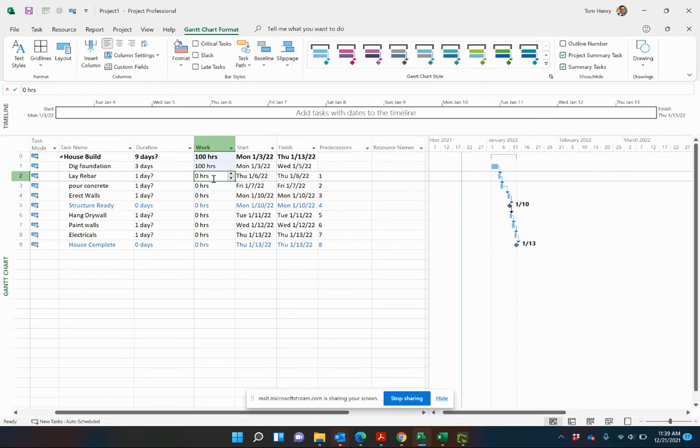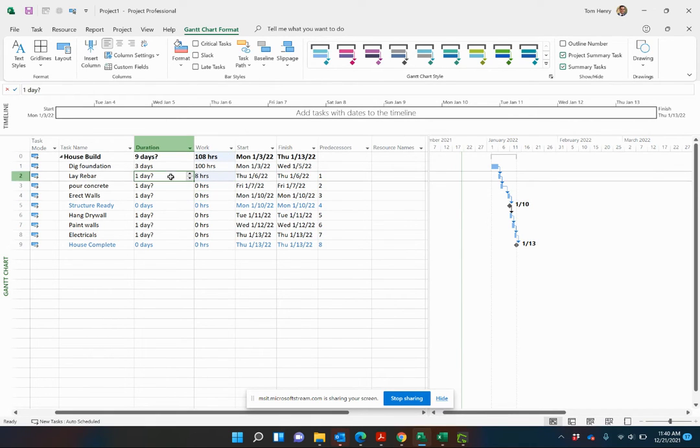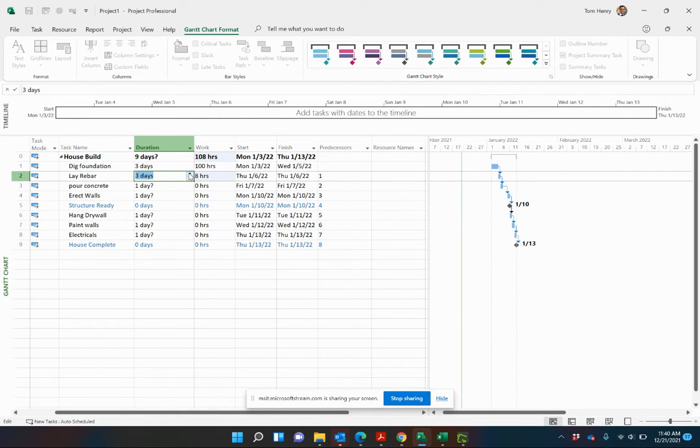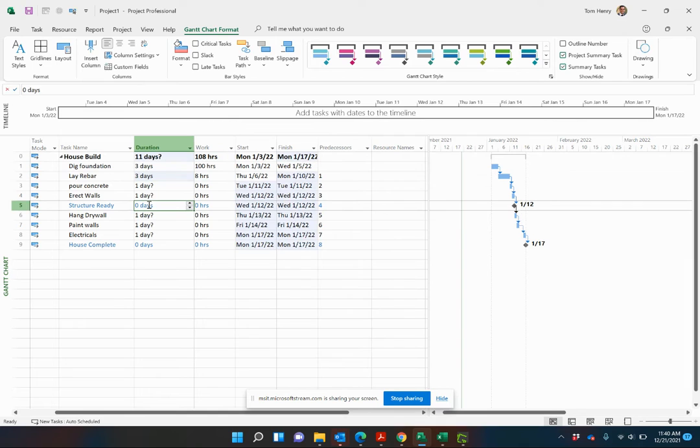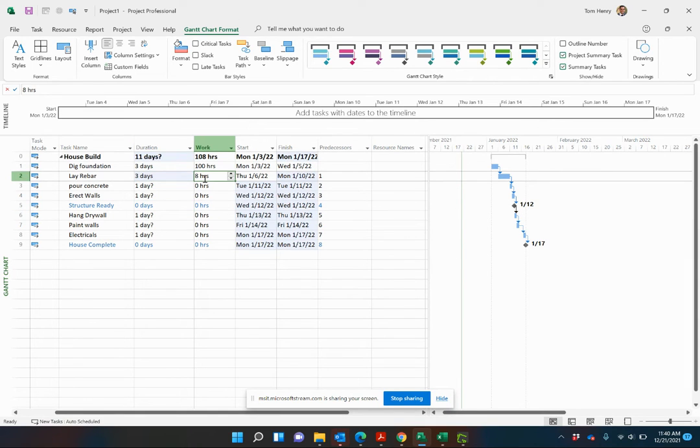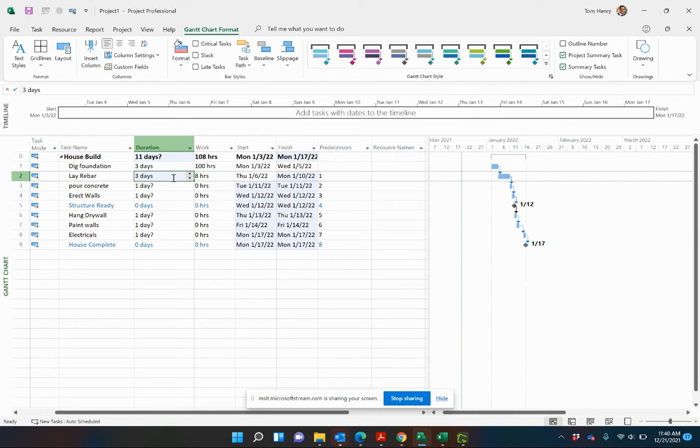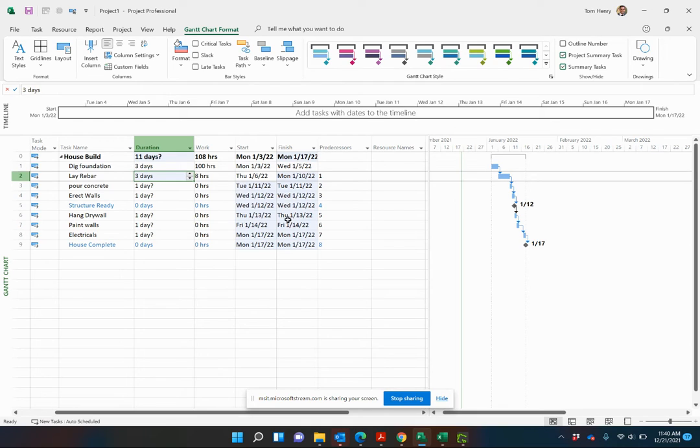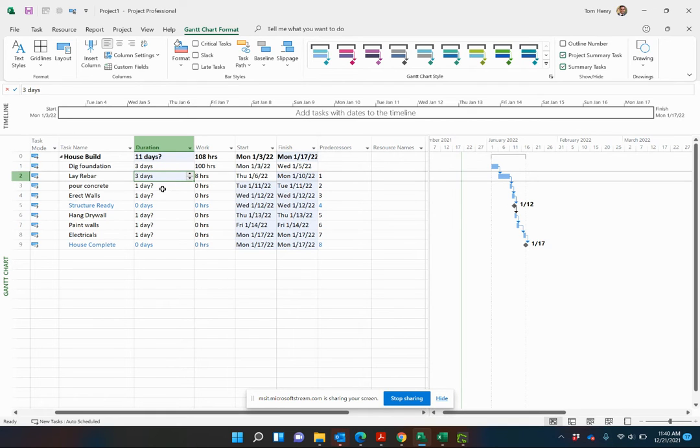To lay the rebar, it's probably only about eight hours of work. Generally takes, you know, you have to go in and put some in and then come back another day. And they generally do that over a three day period. Eight hours of work, three days. You see the disconnect. We've got a little bit of work going on over a long duration. This is the real world. It's really important to actually come in here and estimate not just the duration, but how much effort is involved. So that's going to affect everything from how much hours we have, work hours, how much it's going to cost ultimately.